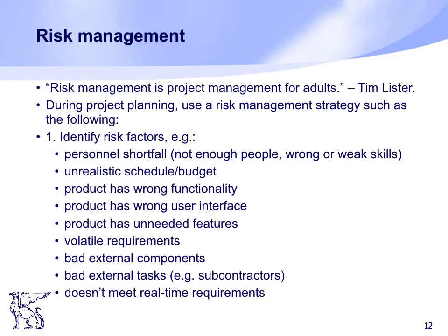I can give you an example. Suppose not having enough members. If you don't have enough members or developers in your project, this can delay the project delivery. So you already know about this risk, right? Such risks are described and included in the project management plan, and these are called known risk.